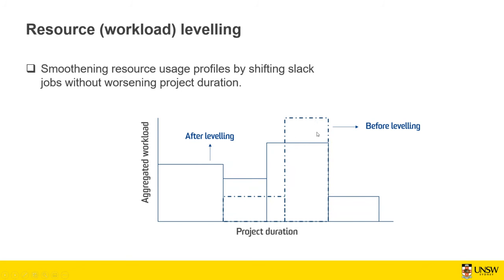So what you can do is assign more duration here in order to finish the task, and assign some of the workload in order to finish this task, if possible, in a shorter amount of time. So you can level your workload somehow compared to the previous version. And this way, you can have a better, smooth workload during your project.